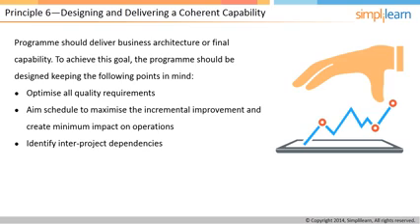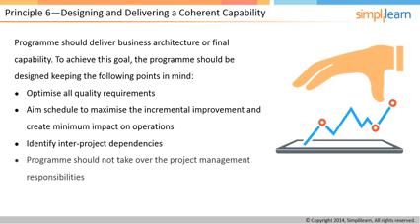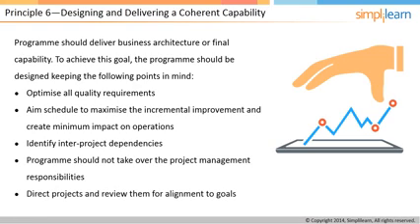Only the situations that cannot be managed by the project and fall outside the defined boundaries should be escalated to program management. Program management should provide guidance to projects and ensure that frequent reviews are conducted to verify continual alignment of projects to goals. The program blueprint should be regularly updated to reflect the changes during the life cycle of the program. If a program at any point of time realizes that the capability delivered by it is not aligned to business strategies, then the program must be closed immediately.